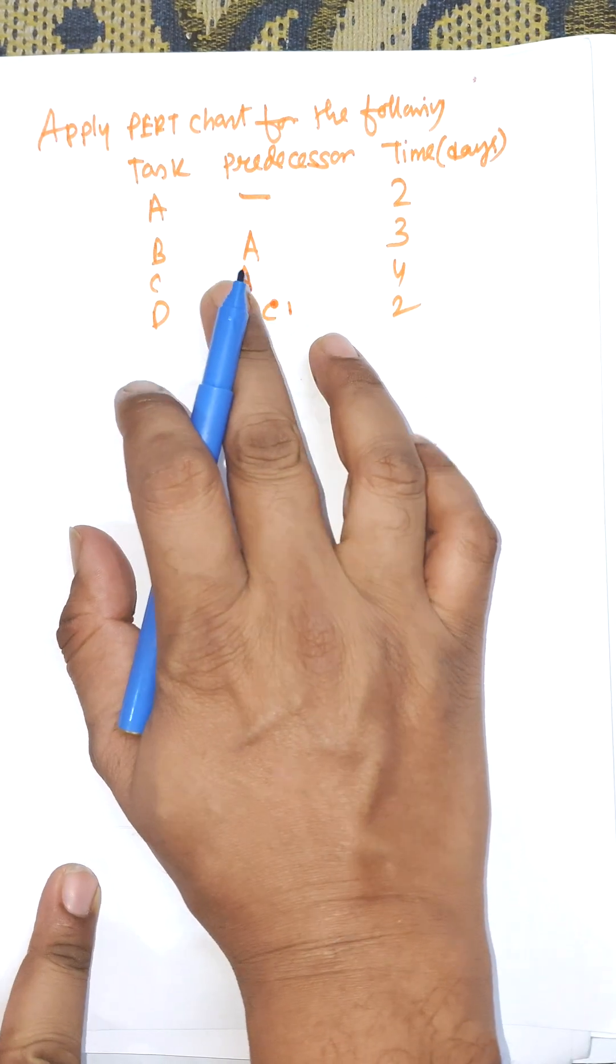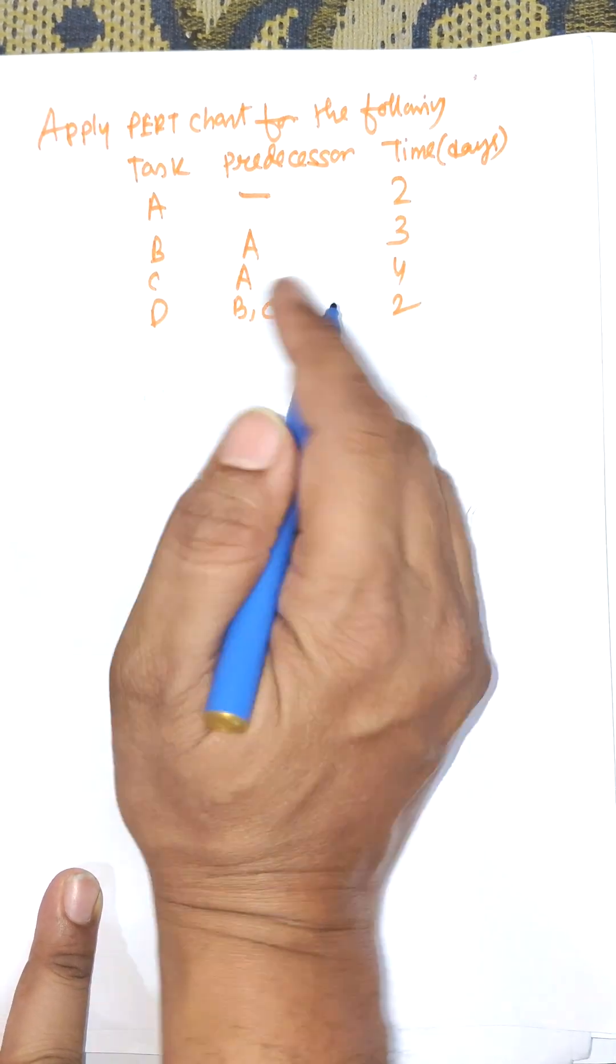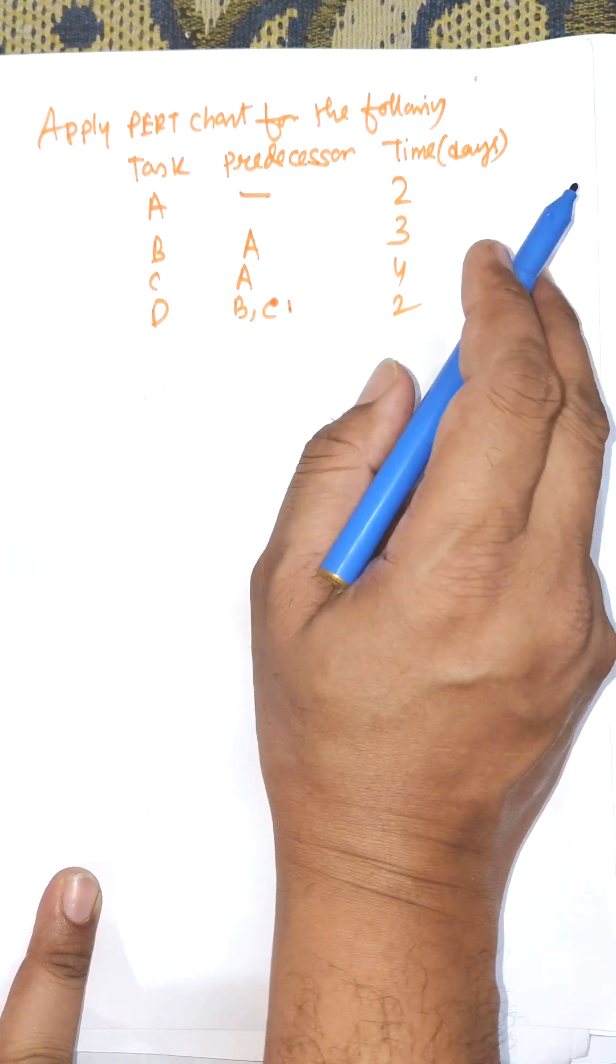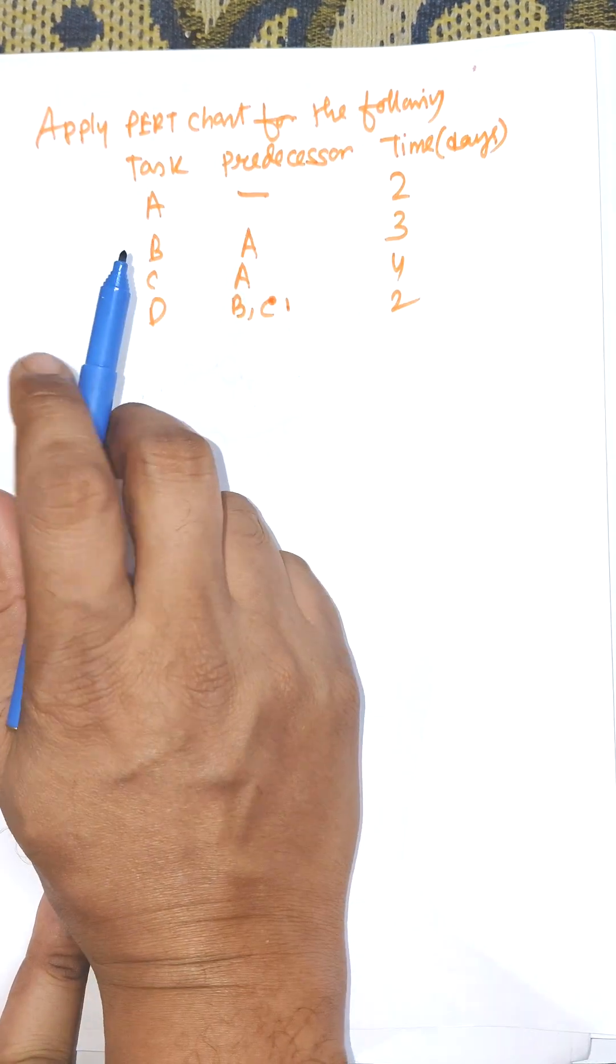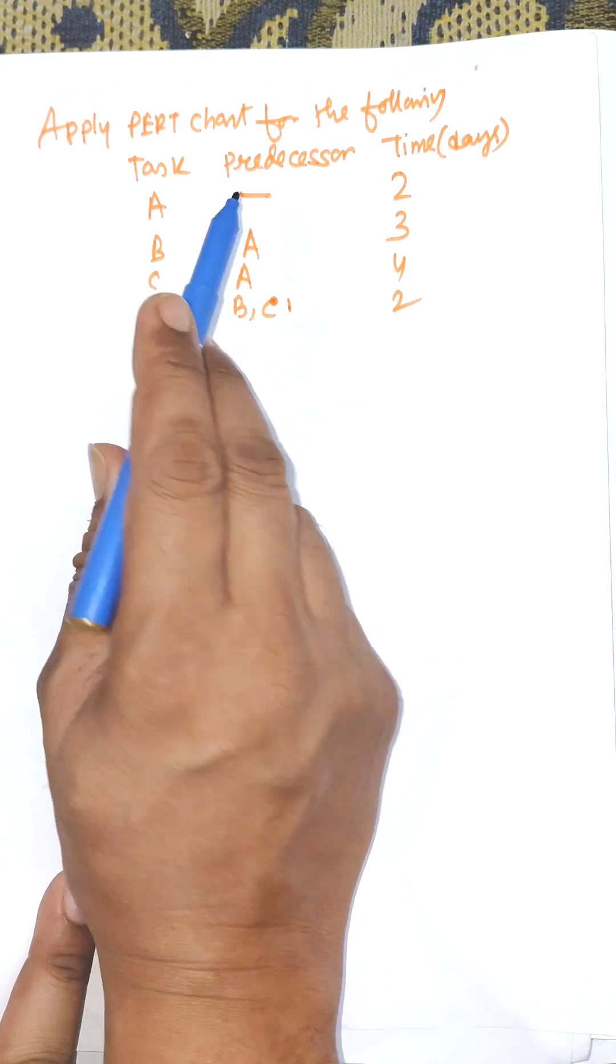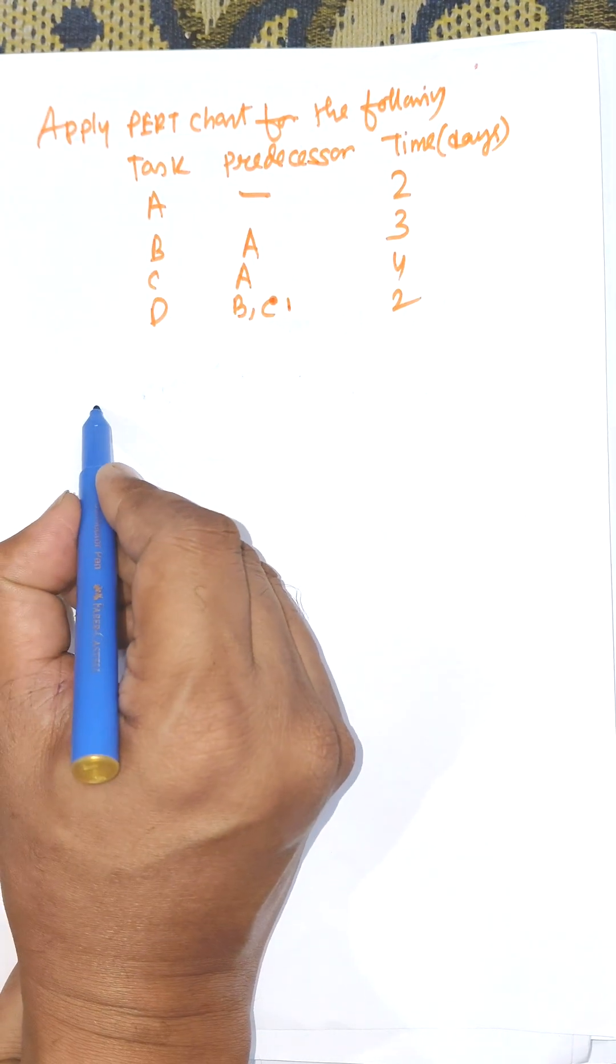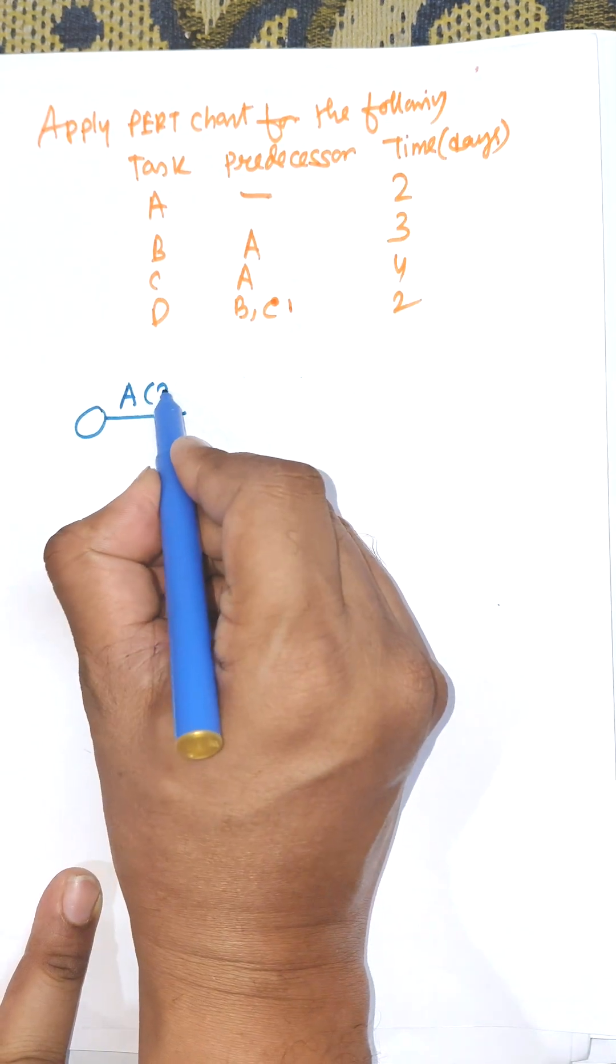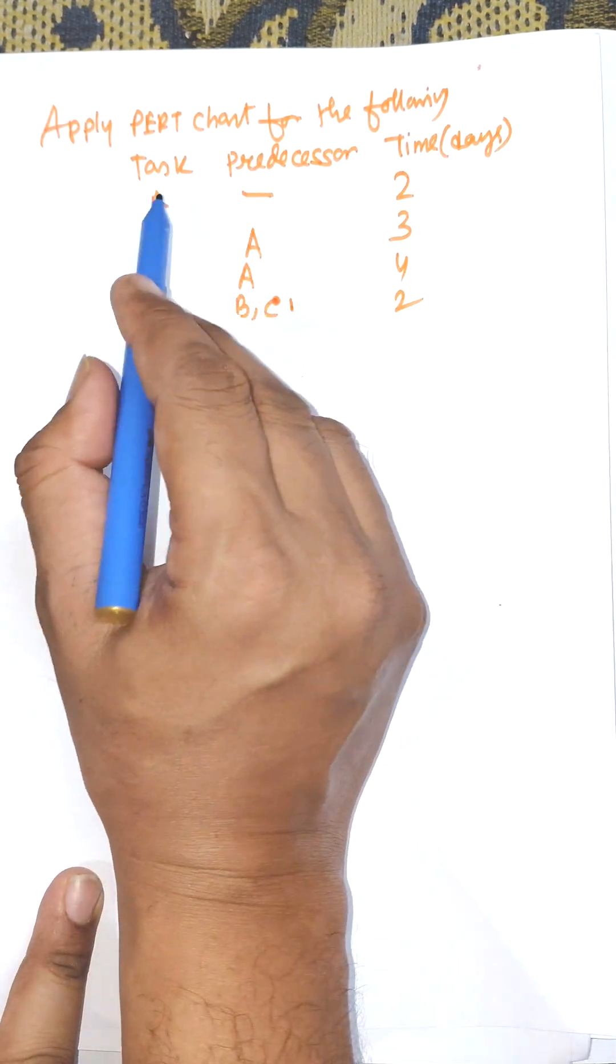Hi everybody, in this video I am going to apply PERT chart for the following table. Here tasks are given: A, B, C, D. Predecessors are given and time in days. The tasks whose predecessors is empty will be considered as starting tasks, so here A is considered as starting task and duration of A is two days.